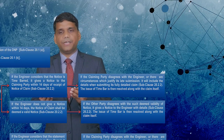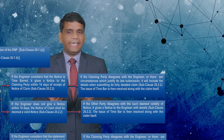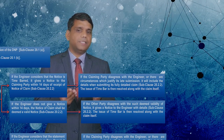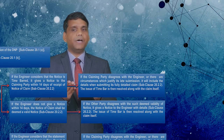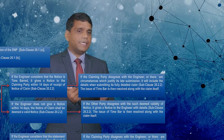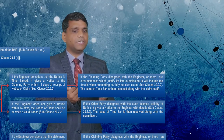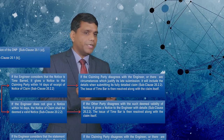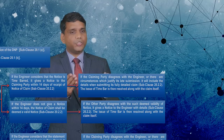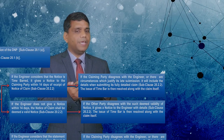If the engineer does not give a notice within 14 days upon receiving a notice of claim, then this notice shall be deemed a valid notice. However, if the other party disagrees with such deemed validity, it gives notice to the engineer with details, and the issue of time bar is again resolved along with the claim itself.